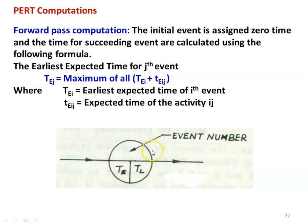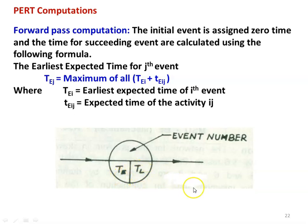For any event, there will be a circle representing the event. We have to divide the circle into three parts: this is the incoming activity, this is the outgoing activity. At the top of the circle, we write the event number — normally 1, 2, 3 up to the end. The bottom portion is divided into two: the left side is for the TE value, earliest expected time, and the right side for the TL value, latest allowable time. In the forward pass computation, we calculate the earliest expected time; in the backward pass computation, we calculate the TL value.